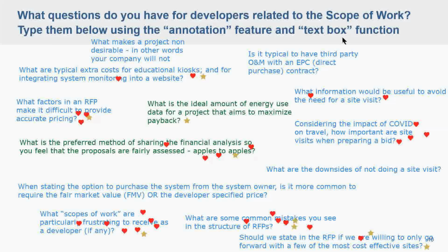Other couple things are, what type of ITC assumption are they using? Are they assuming that they're safe harboring the panels at the 30% number if they already have a large stockpile, or 26% for this year? So those are just a few of the ones that pop up. And again, we try and get as much right the first time around, and then be ready to do a second round with shortlisted bidders to get everyone closer.